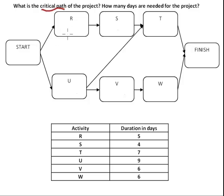R is 5, S is 4, T is 7, U is 9, V is 6, W is 6. So my question is, how many paths does this network have? Well, there are three paths.